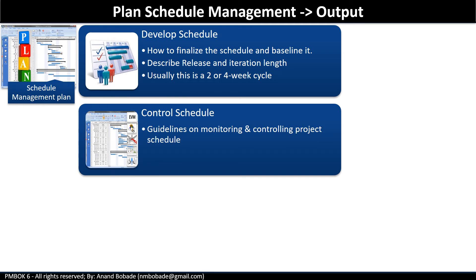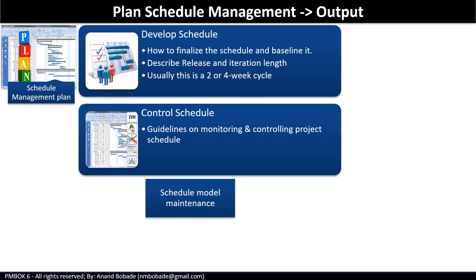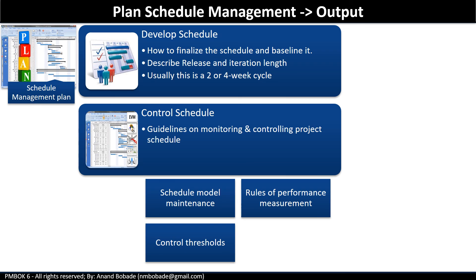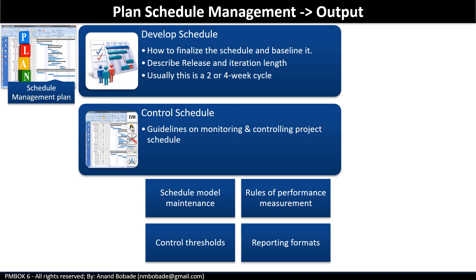For control schedule, the plan contains guidelines on monitoring and controlling the project schedule, including project schedule model maintenance, the process used to update status and record progress, and rules for performance measurement — for example, how earned value measurement will be used to monitor schedule performance. It also includes control thresholds: variance thresholds for monitoring schedule performance, and if performance is not within an agreed threshold, what actions or procedures are to be followed. Finally, it includes reporting formats — the format, frequency, and recipients of the schedule progress report. All this information will be included inside the schedule management plan.